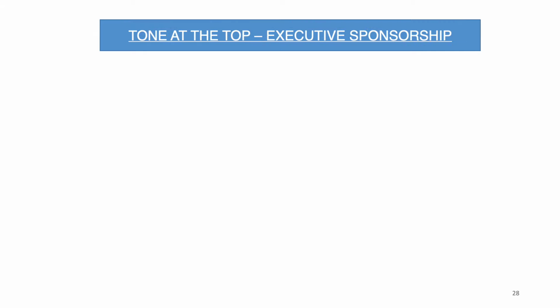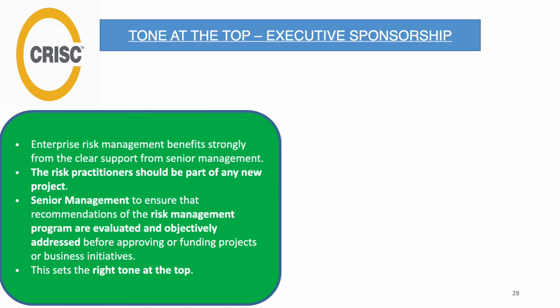Tone at the top, that is executive sponsorship. Senior management should require consultation with the risk practitioner as a part of a new project and ensure that recommendations of the risk management program are evaluated and objectively addressed before approving or funding the project or business initiative, because enterprise risk management benefits greatly from their clear support.